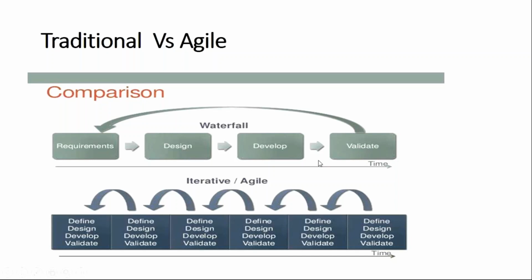And you'll find that as the arrow goes, anything which needs to go back has to again start from the requirement. They'll validate the requirement. Again, the design is going to happen. The development is going to happen. And finally, they are going to come to the QA. Until this phase, customers were never involved. So how is it different in case of Agile?